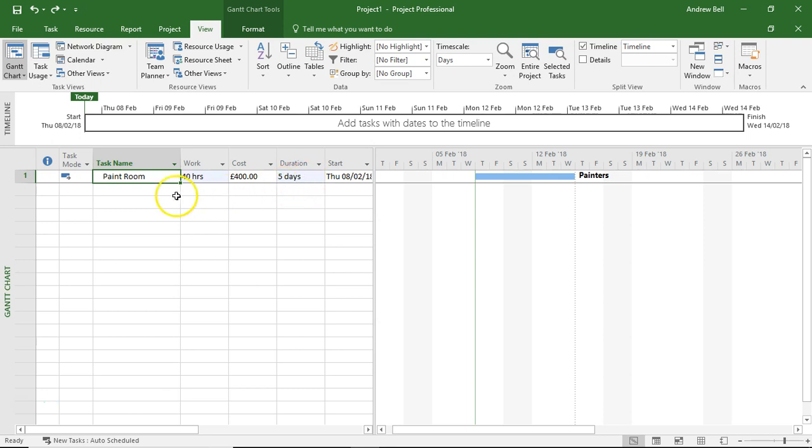At the moment, this guy is doing 40 hours of work in five days. He's saying he's 100 percent efficient and he's going to charge all of the time to the project.